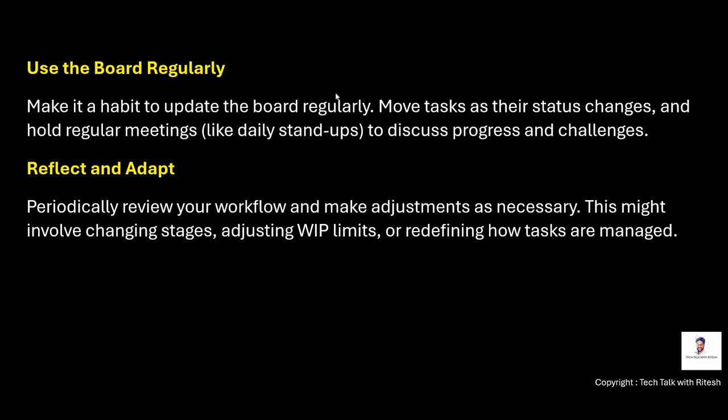Make it a habit to update the board regularly. We sometimes have stand-up calls too, for example a 15 to 20 minute call where all the team members join and explain, okay, this is the task which was in to do yesterday, and now I started working on it, so that's why it moved to in progress state, something like that. And move tasks as their status changes, and hold regular meetings like daily stand-up to discuss progress and challenges.